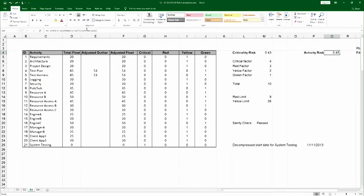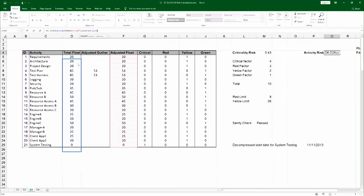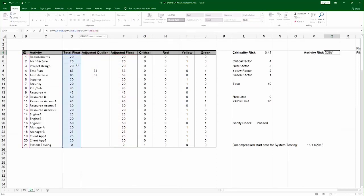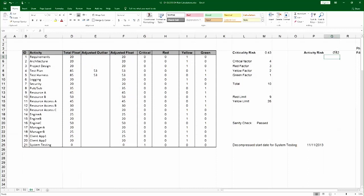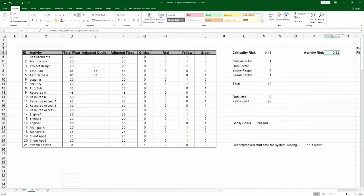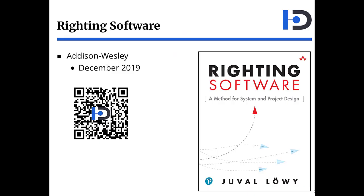Let me show you what it would look like if I would not do the adjustment. I'm just going to move the floats to the original total float. You can see it jumped markedly higher to 0.62. So obviously, it's a good idea to adjust the floats here. For more on project risk, see writing software.